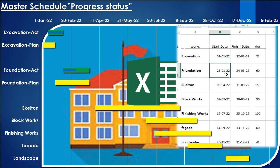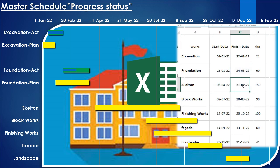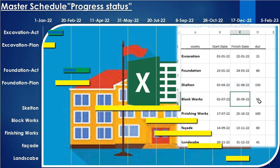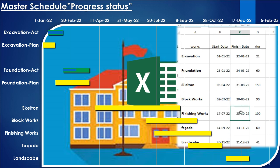Beginning with excavation works that begin on the first day for a period of three weeks, followed by foundation works for a period of two months from the end of the excavation works, followed by the structure works starting after finishing the foundation works with a period of ten days. Then brick work begins three months after the start of the concrete structure works and ends after the finish of the concrete structure in a month.